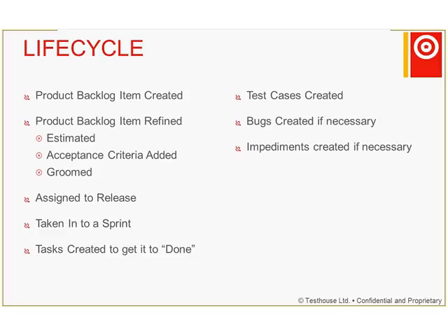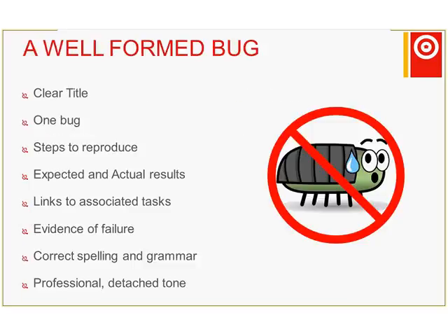In terms of bugs, the Microsoft software, in particular Microsoft Test Manager and Visual Studio, have mechanisms for creating fault reports quite easily. From Microsoft Test Manager, you can run a test within MTM, and then if something goes wrong, click a button and most of the fields of a fault report will be filled in for you, and then you submit that and it's put into Team Foundation Server, where it will be managed as any other backlog item.